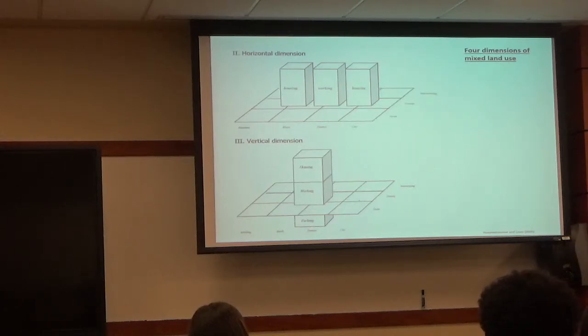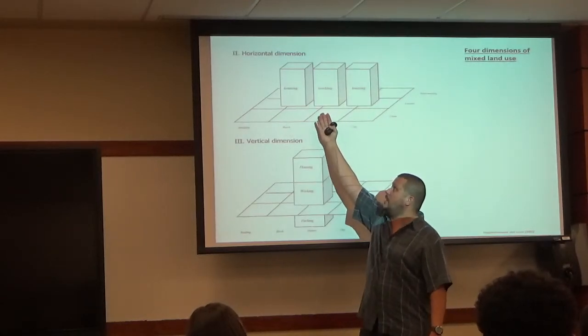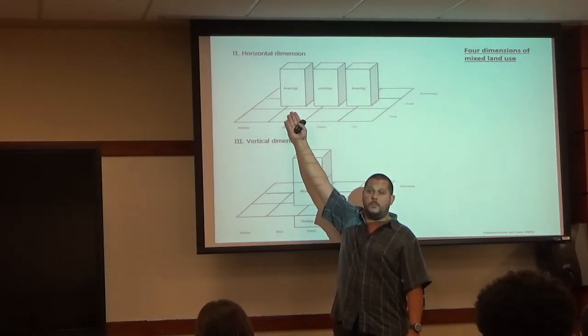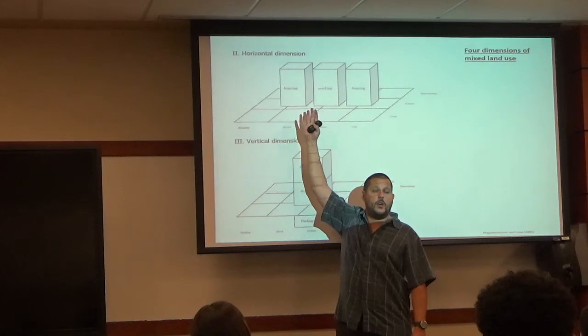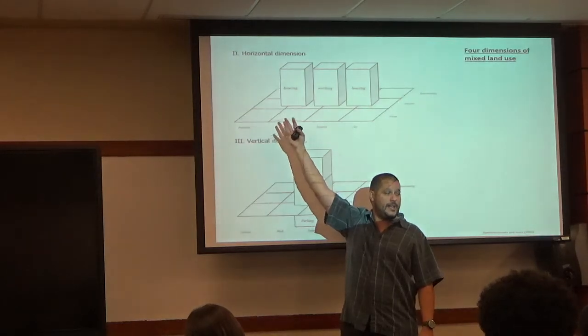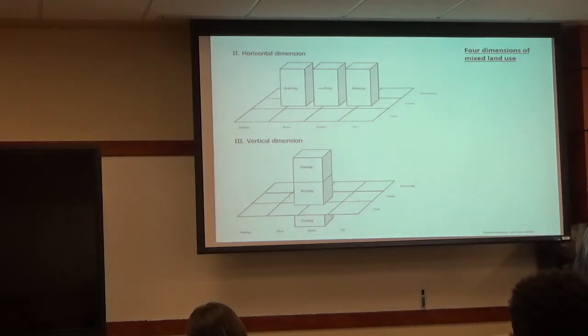Remember I talked about phasing? If this doesn't work out, if this is working, this works as well, but then my market collapses or my numbers are not good enough anymore, I'm not building this anymore. There was a reason why I could see the Home Depot Walmart section, Michael's, was already built out and some of the townhomes not. Some have been ready, some have not even been put on the ground yet. Why? Because you're putting this out in a different finance model. You're phasing them out. They are sometimes refinanced, and you don't build the building before it's actually leased out with X amount of tenants.